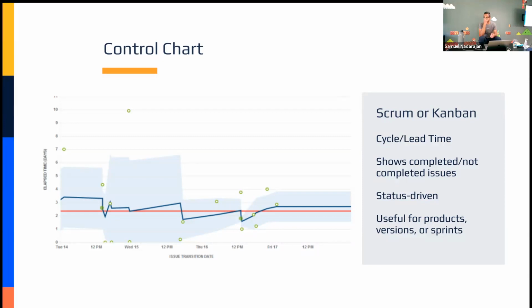you could filter based on certain issue types possibly to create them? Yes, you could filter based on issue types. If you configured a board filter that said only include stories or only include tasks, then you would create that quick filter, and then on your control chart, you would select that quick filter, and that would limit your data to whatever issue type or other quick filter you apply. Okay, I was also thinking about outliers, because I could also filter based on story points equal to something, just to be able to see big tickets, a rolling average of a certain category of tickets.